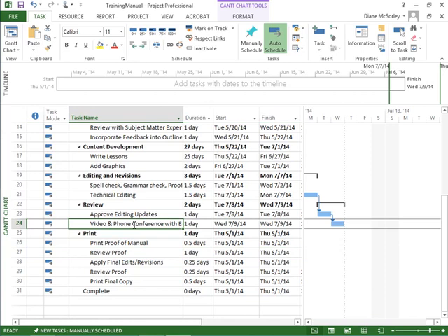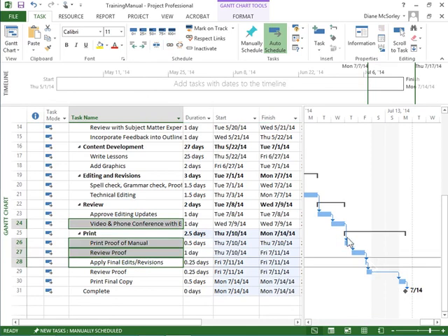And they pop back out and they're all linked, finish to start. So just a good thing to know, if the tasks are already linked and you move them around, they remain linked to who they were linked to. The lines go crazy and your project will probably go crazy too. It gets very confusing. So if they're already linked and you need to move them, unlink them, use the unlink button, move them into the right order, and then relink.